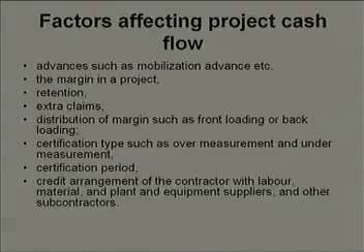and then try to show you its impact on project cash flow. Then we will also see what is the impact of retention. Suppose you have got a higher percentage of retention for your project, it may affect project cash flow. If you have got lower retention, it may have a different impact. You must be aware of the fact that in lieu of cash retention these days, some contractors prefer a bank guarantee, so that cash is not blocked.